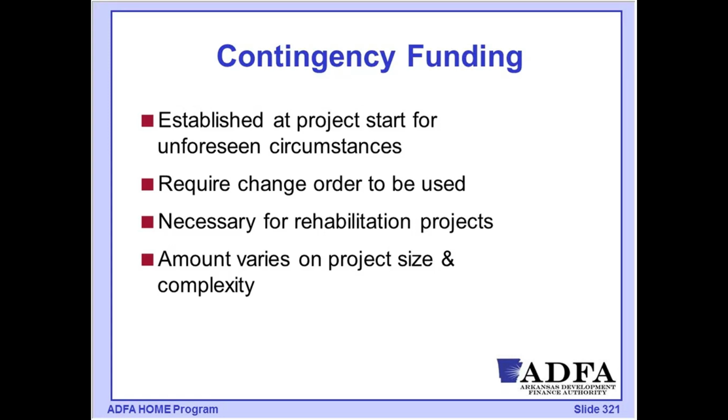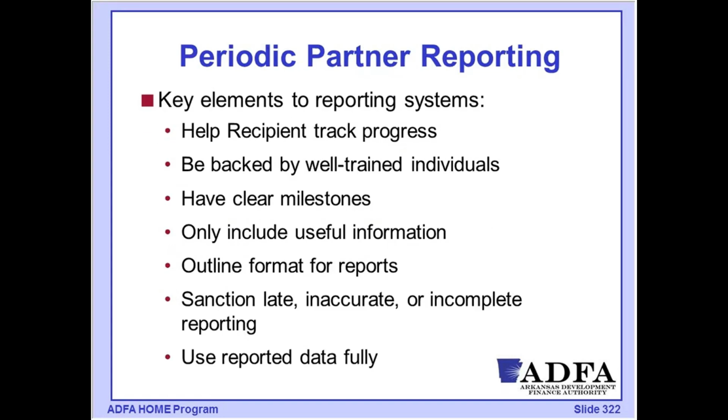This is something that's necessary for our rehabilitation projects because, of course, there's some unknowns before we open up walls or tear off some materials to see what conditions might lurk underneath. That level of contingency funding that makes sense is really going to vary on the size of the project, what those unknowns are, the complexity of that project, and that's something that ADFA in reviewing the funding would make a determination on.